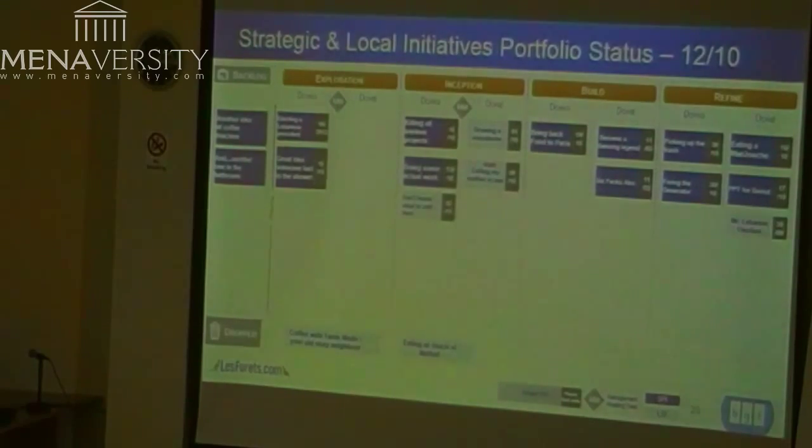So for big ideas, you can start to speak to the management. When you put something in the first column, expect to have a month and a half to get it done, because we've done 100 of them, and it usually takes that statistically. So we can start to speak about the Kanban vocabulary to say the lead time is that. But we don't do it yet.